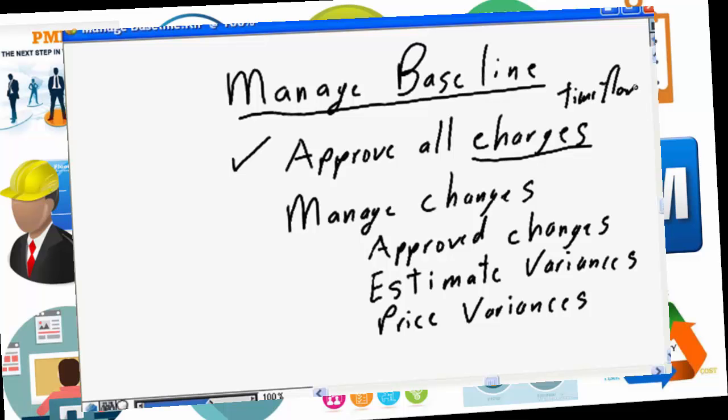If a large invoice came into the organization for your project, you know the invoice has been received, or you're expecting to receive the invoice. Therefore, your cash management plan says, for this month of my project, I need to be prepared to spend $20,000 for this material. And you look at your accounting sheets at the end of the month and the charges in there. You need to go looking for it to ensure that the invoice has been received.